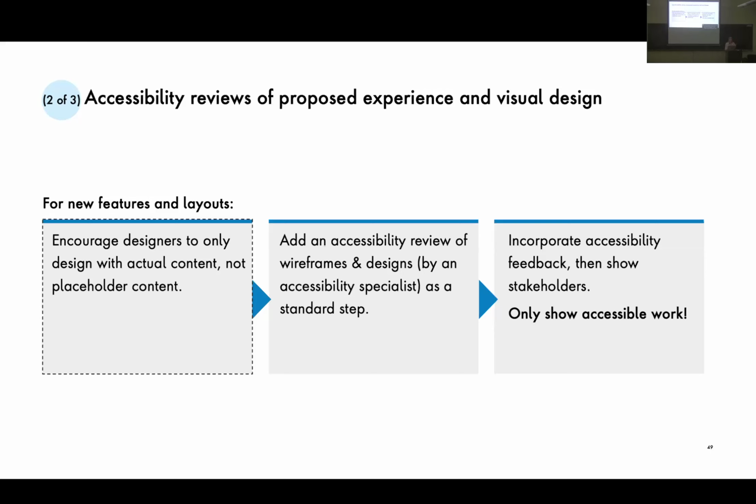Sometimes it's more waterfall-y, like the writer will write something first and then it goes to the designer or the wireframe and then they make the mock-up, etc. Or sometimes it's backwards and the designer is just trying to think of a cool layout and they don't even know what the content is yet. What I've found in my experience is that when they're doing it, I'm calling it backwards, when they just try and think of a layout without knowing what the content's going to be, that is never usable. It's never as good, it's never as powerful as if they wrote it first. So I always encourage them, please try and get that actual content before you start designing.